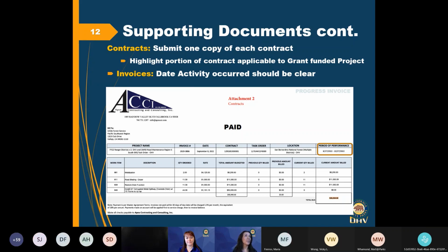If you didn't know it was going to happen, but all of a sudden you had somebody out there helping you on your project that you didn't necessarily anticipate, we would still consider it as long as it's within the performance period and it makes sense. So you can have new lines of match pop up during your performance period. That's okay. Ideally, you'll be emailing us before it actually happens so we can talk about it first and make sure it's applicable.